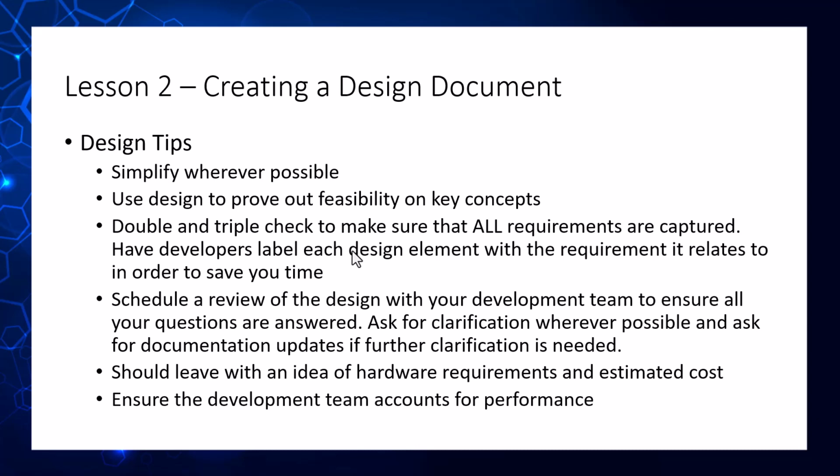If you get your design document sent to you, just make sure that you're scheduling a review meeting with the development team on a call. It's very easy to get a document and read through it and say this sounds like what I want, but you want to make sure that the two of you are communicating. If there are things that need clarification, make sure you're getting your questions answered. Don't rely on a development team on a phone call to tell you, oh yeah, that's what I meant. If clarifications are required, make them update the documentation to reflect those changes.